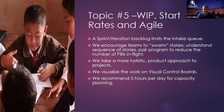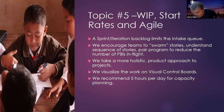If you have two people working on one story, you're going to have higher quality. And because you're swarming on that story, you'll actually get it through the system faster because you have less work in progress — a double bonus. You're not incurring technical debt, and you're getting work done sooner because you're concentrating on fewer items. I know it's counterintuitive. The complex world is strange. We evolved in the simple and complicated world, so our brains default to that — that's what intuition is.